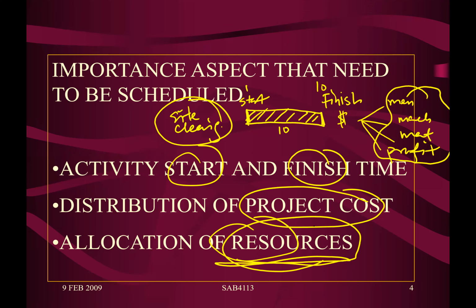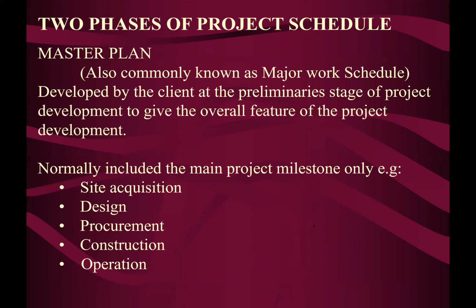And out of that resources, you will reflect the cost. You can bring a bigger capacity bulldozer, but bear in mind that the bigger the machine, the higher the renting rate or the cost. That is what normally, the association of the machinery is based on the output capacity.